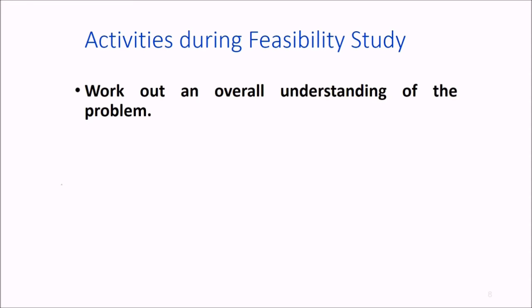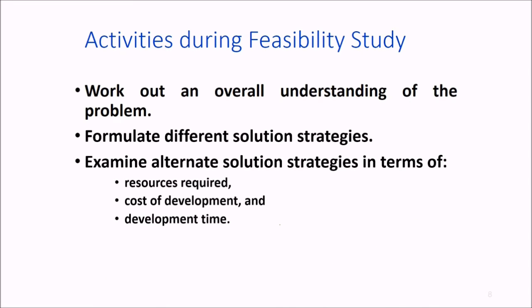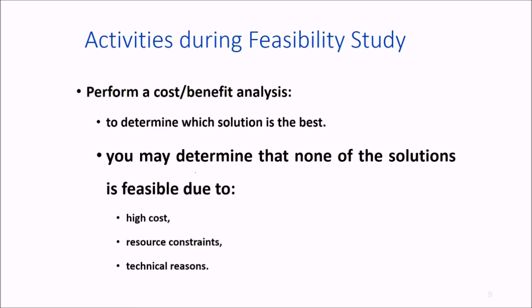What are the activities during feasibility study? First is overall understanding of the problem - problem not understood or misunderstood will lead to product or project failure. Then what may be the strategies to solve, so we formulate strategies. Then examine alternate solutions in terms of resources that may be required, the cost involved for development, and the time or schedule. Then we perform a cost-benefit analysis to determine which solution is best, and you may also determine that none of the solution is feasible.